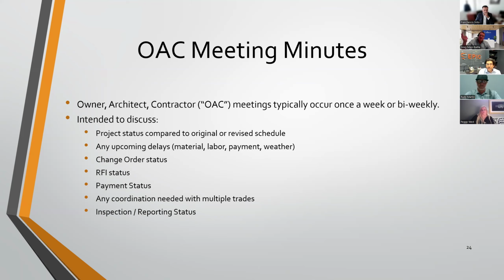Any RFIs, change orders, pay applications, any documentation associated with that week's meeting, including a schedule update if it's needed, will be issued to the stakeholder group for that week as a whole, including the property manager.